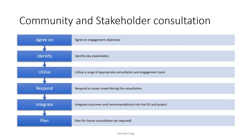Do not underestimate the power of community and stakeholder in your project. We also need to plan for any future consultation which may be required, and this will vary depending on the project and how large it is. Some very large construction projects require many months of consultation with multiple visits and multiple approaches.